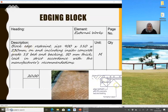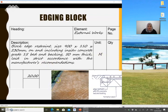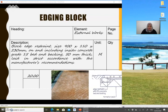Block edge restraint — this is the edging block at the boundary of the paving area. You must mention the size and include setting on in-situ concrete Grade 15 bed and backing 50 mm thick, in strict accordance with the manufacturer's recommendation. It is normally measured in meters. The edge block is placed at the edge of the paving blocks. The cross section drawing shows the edge block with details such as formation level and whether sand or concrete is used as a bed.